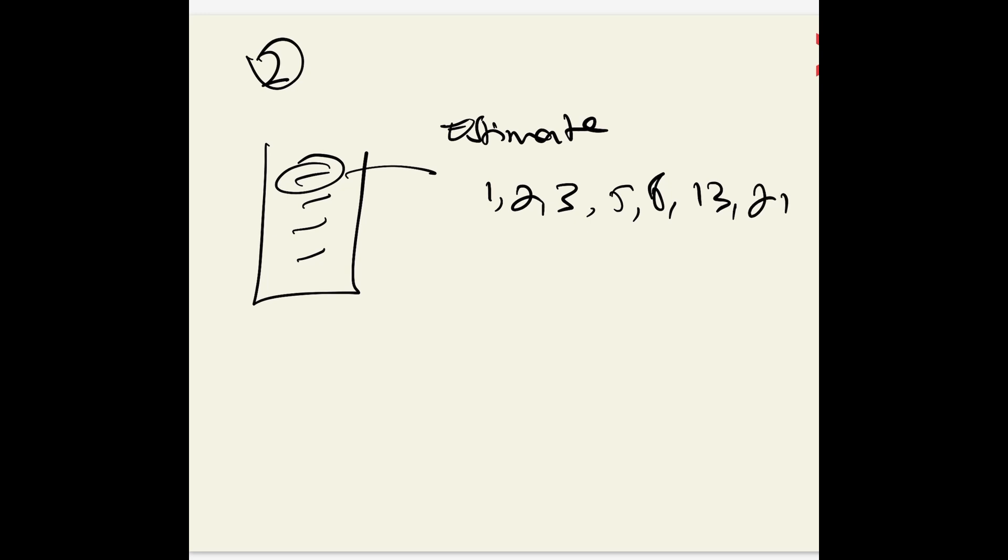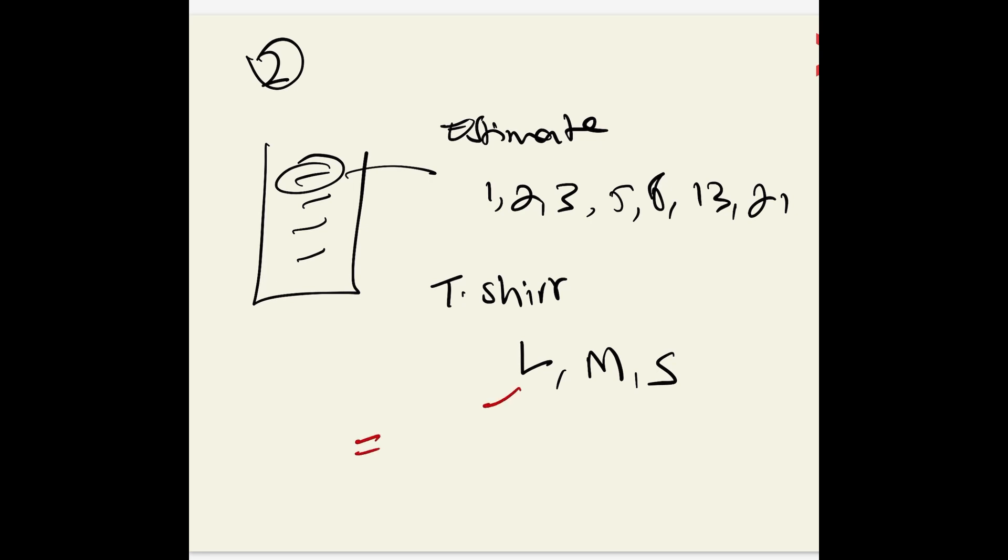If they don't know, you can use t-shirt size estimation which is large, medium, and small. The problem with this is that we need to say: if it's large, we're going to assume it's 8 story points; if it's small, we're going to assume it's 1 story point; and if it's medium, we're going to assume it's 3 story points.